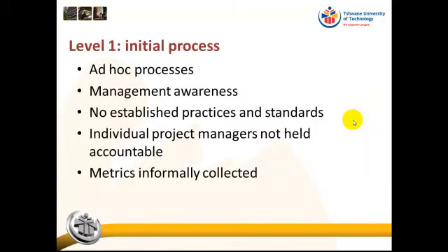Right, so a little bit more detail on each of the levels. At level 1, we have ad hoc processes. There is management awareness of the fact that there is such a thing as project management and that we maybe require it, but there are no established practices and standards. And individual project managers are not held accountable. So if an individual project manager follows a proper process, and the project manager who sits next to him or her does not, it doesn't really matter because no one is held accountable.